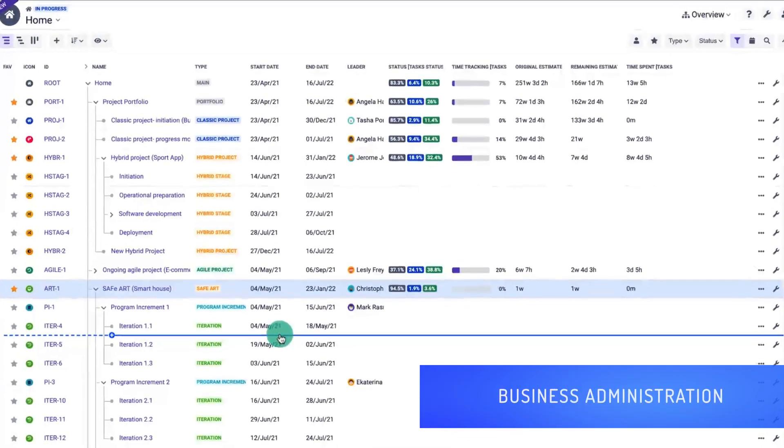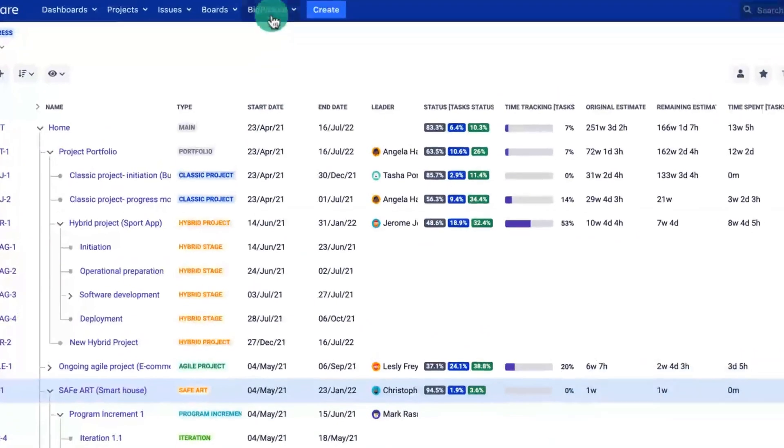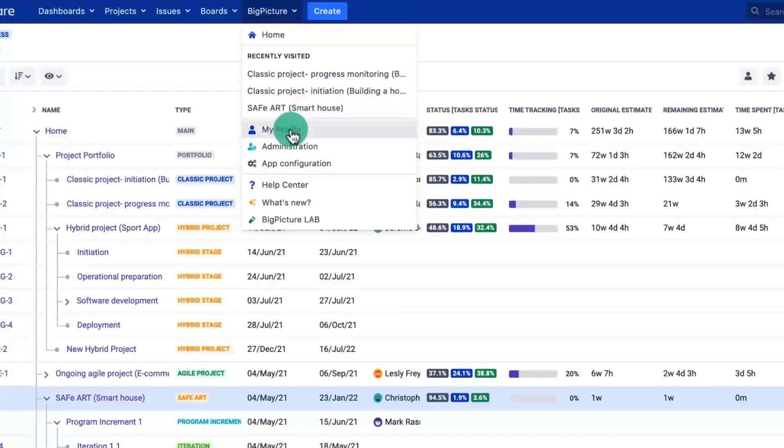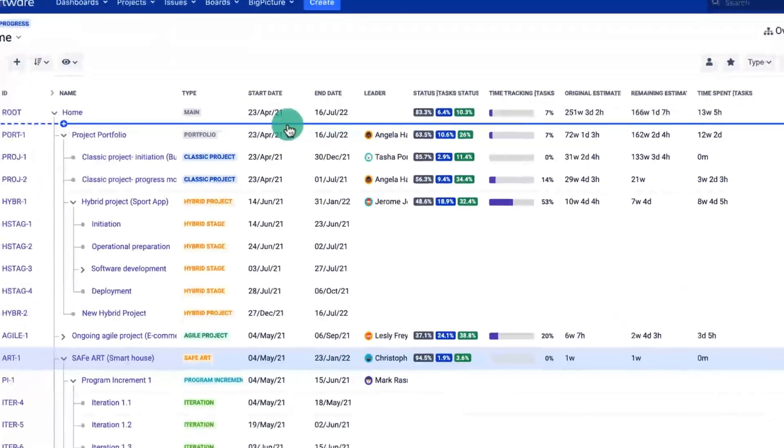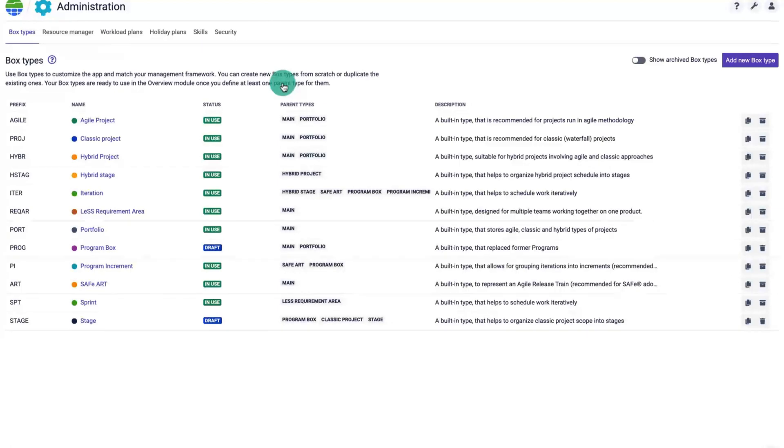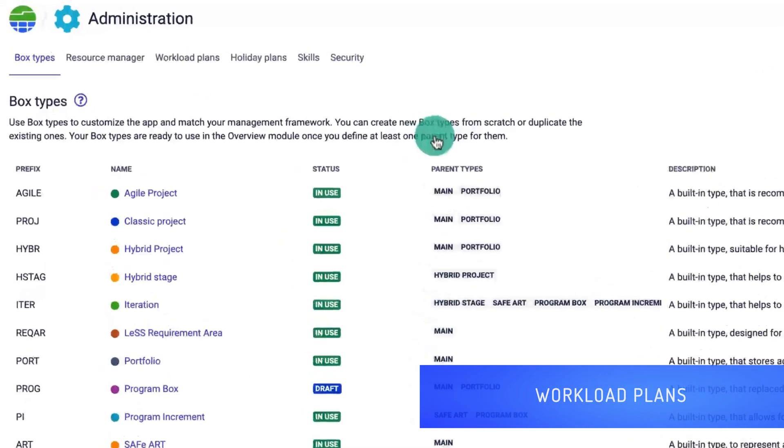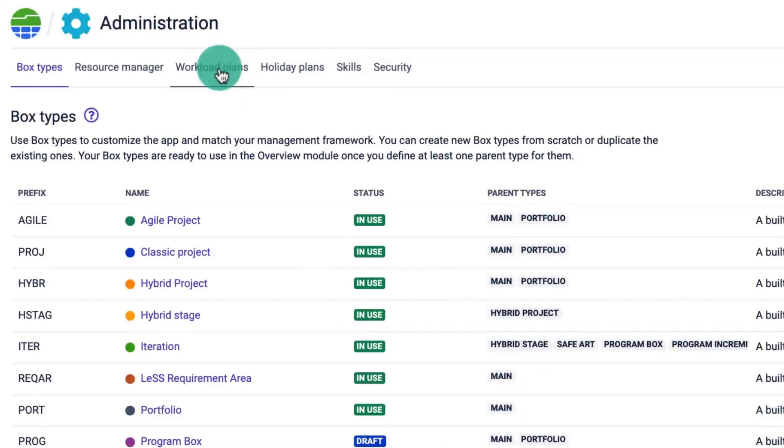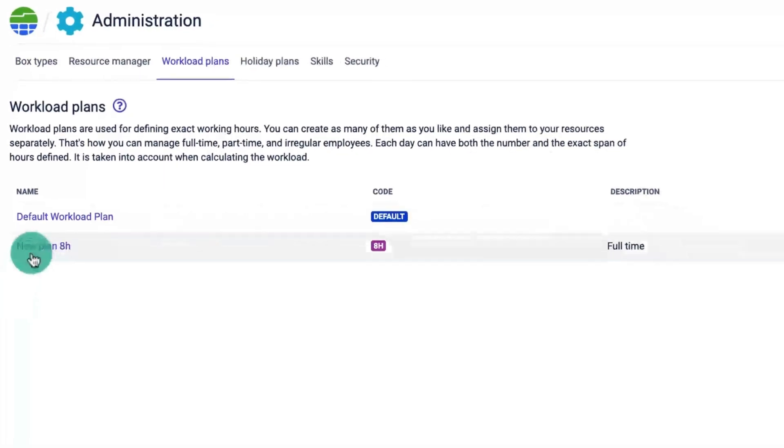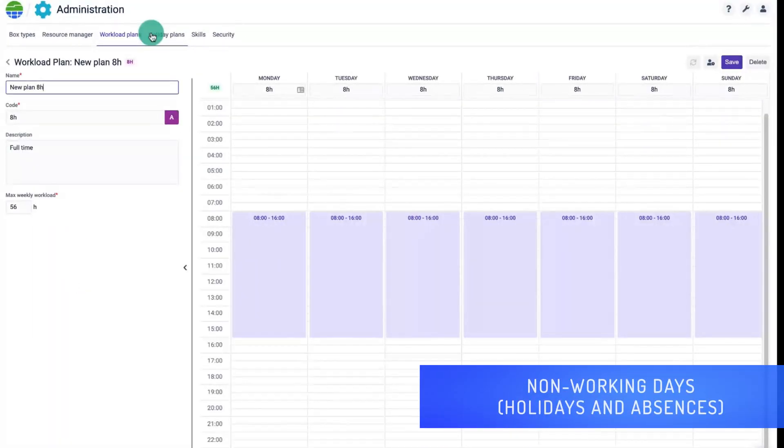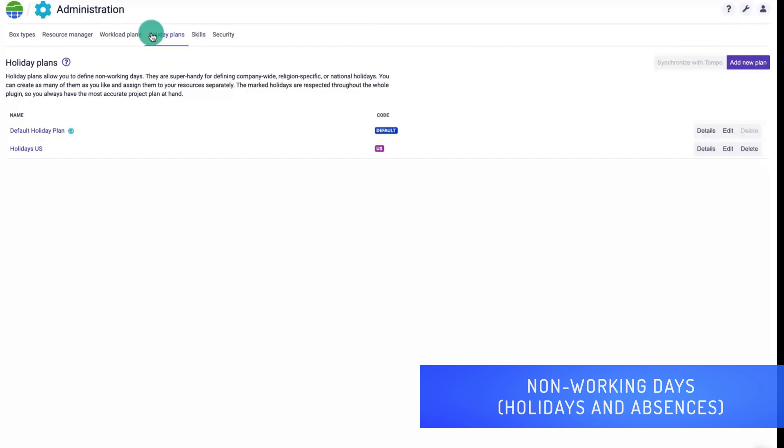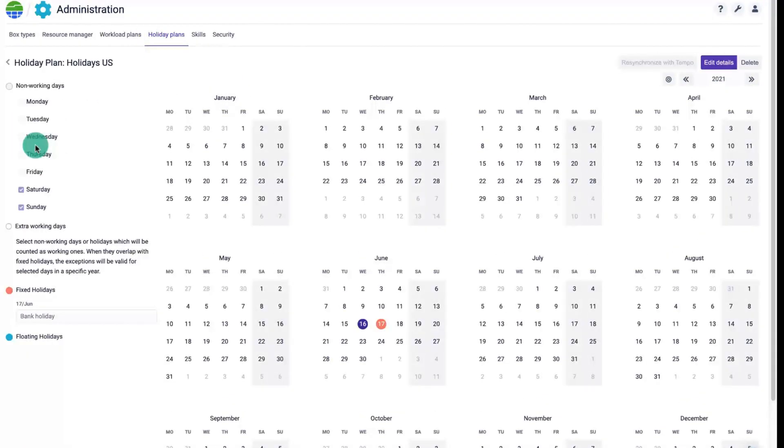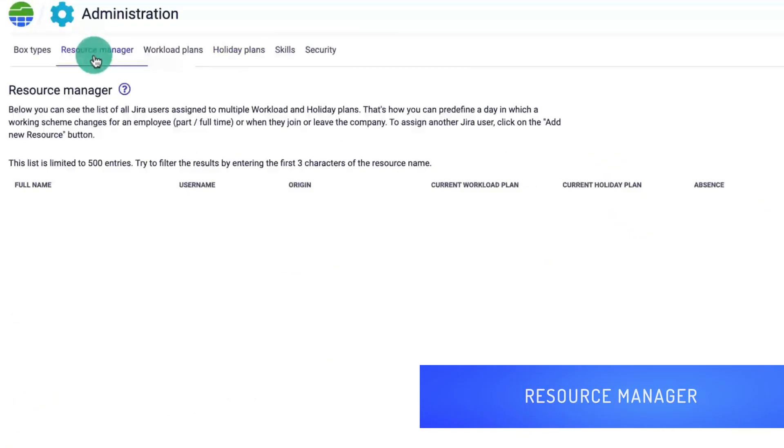First let's have a look at the administration. Here you can create workload and holiday plans which will be the basis for capacity calculation. The workload plan determines the hours available each day and the holiday plans and absences will be the non-working days. The capacity in a given time period is calculated as the difference between working and non-working days.